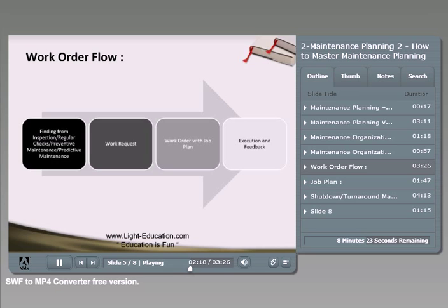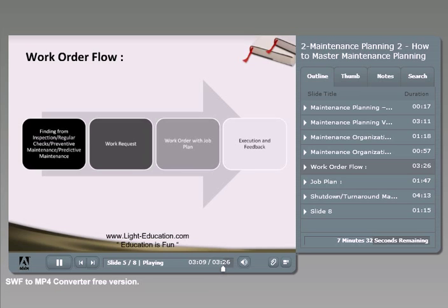After the job is planned and ready, the planner issues the work order to the execution department. Once the execution team completes the job based on the schedule, they close or complete the job in the system and provide feedback on the job plan. Was the estimated material, manpower, and duration realistic? They keep improving job plans so that the next time the same job is done, it is completed faster, safer, and in a more cost-effective way.